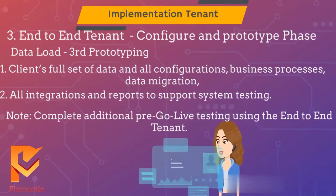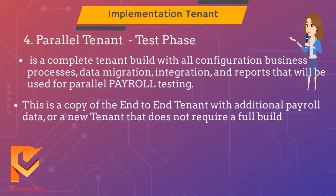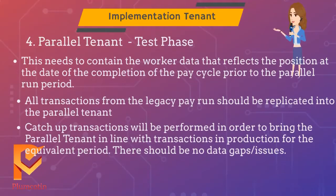The end-to-end tenant is a comprehensive build that includes the client's full set of data and all configurations, business processes, data migration, integrations, and reports. Parallel tenant will be used for parallel payroll testing. This is a copy of the end-to-end tenant with additional payroll data, or a new tenant that does not require a full build. The parallel tenant needs to contain the worker data that reflects the position at the date of the completion of the pay cycle prior to the parallel run period. All transactions from the legacy pay run should be replicated into the parallel tenant. Catch-up transactions will be performed to bring the parallel tenant in line with transactions in production for the equivalent period. There should be no data gaps or issues.